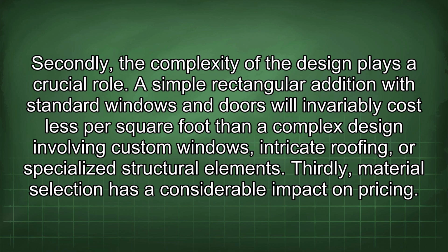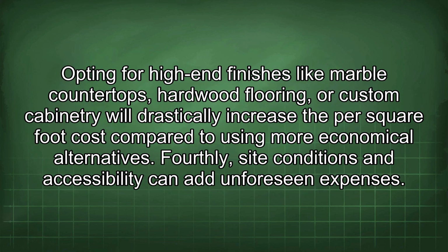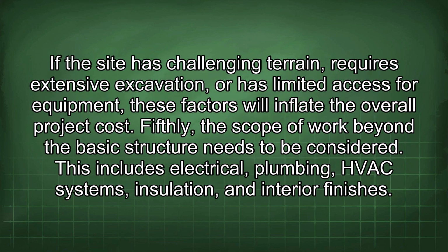Thirdly, material selection has a considerable impact on pricing. Opting for high-end finishes like marble countertops, hardwood flooring, or custom cabinetry will drastically increase the per square foot cost compared to using more economical alternatives. Fourthly, site conditions and accessibility can add unforeseen expenses. If the site has challenging terrain, requires extensive excavation, or has limited access for equipment, these factors will inflate the overall project cost.